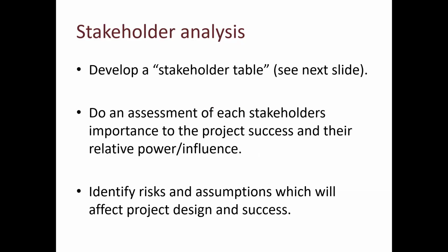As usual, it has a template, not Excel, and this time maybe a Word. You can do it in Excel as well, but it's mainly not an Excel sheet, no formulas, no calculations. The core is I'm doing an assessment of each stakeholder's opinion in my project and whether he is supportive or resistant or neutral, because some people are neutral. And I will give you an example.